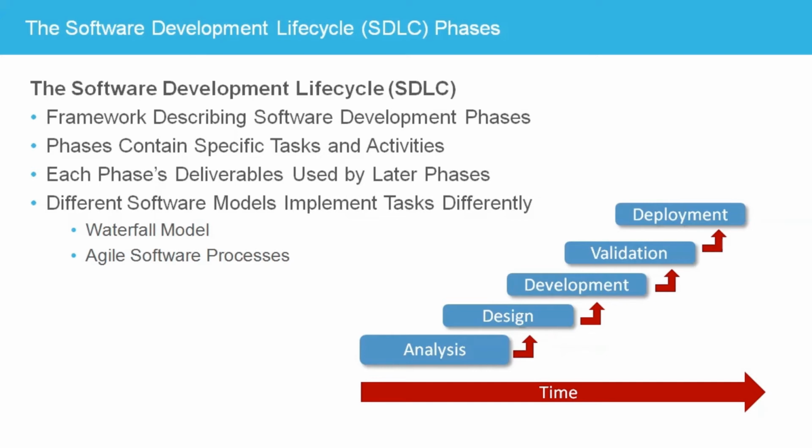For IT systems, deployment may also include procurement of the application's production environment, including servers, software licenses, cooling, networking, power, and personnel to support the system. The transition to the new software includes operator, administrator, and user training, and setting up the help desk support.